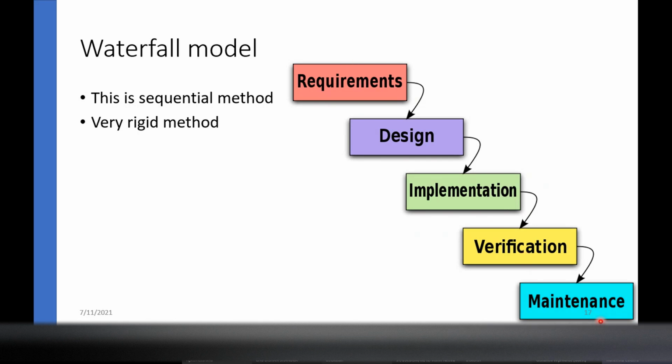That's why this is a very tight process, very hard to maintain if our requirements are changing rapidly. If our requirements are changing rapidly, this is not the best fit.